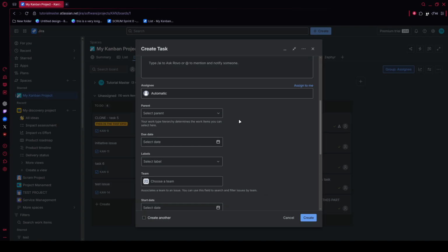If you want a more visual planning view, open Calendar from the left sidebar. Here you can see campaign items laid out by date. You can drag and drop a task to a new day, and Jira will automatically update the schedule. This is especially useful when launch timing changes and you need to adjust quickly.